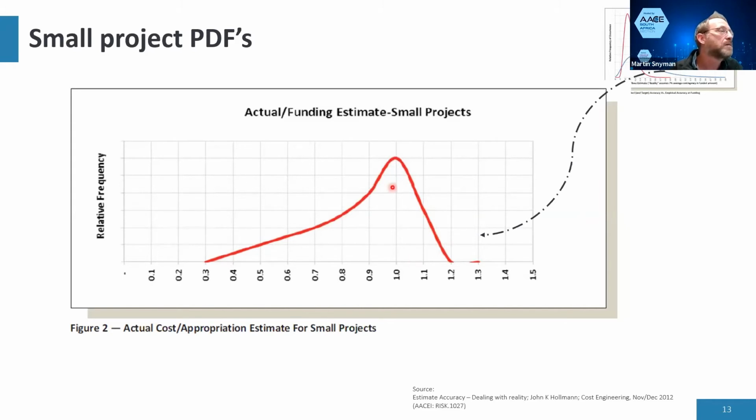They tend to run in well under budget, and if they overrun, it's a very small overrun. They typically refer to this curve as a cresting wave. And what this means is that on your small projects portfolios, you might have a lot of money tied up in estimates because remember, they fund at the one and then finish up early. So they end up building in so much fat that they tie up CapEx for other projects.